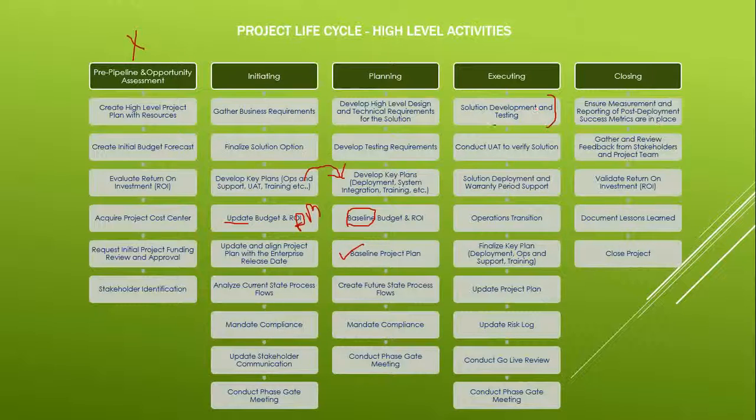Once the coding is done, you start with system integration. Once system integration is done, you do the UAT. Once all of this is done, and if there are no outstanding defects, everything is set to go and you do the deployment. Once deployment is done, depending upon the corporation structure and timeline, you do the post-production warranty for 30, 60, or 90 days, whatever timeline they follow. The warranty makes sure that nothing is breaking when it gets to production. Once everything goes green with no issues, you hand it over to the operational team.